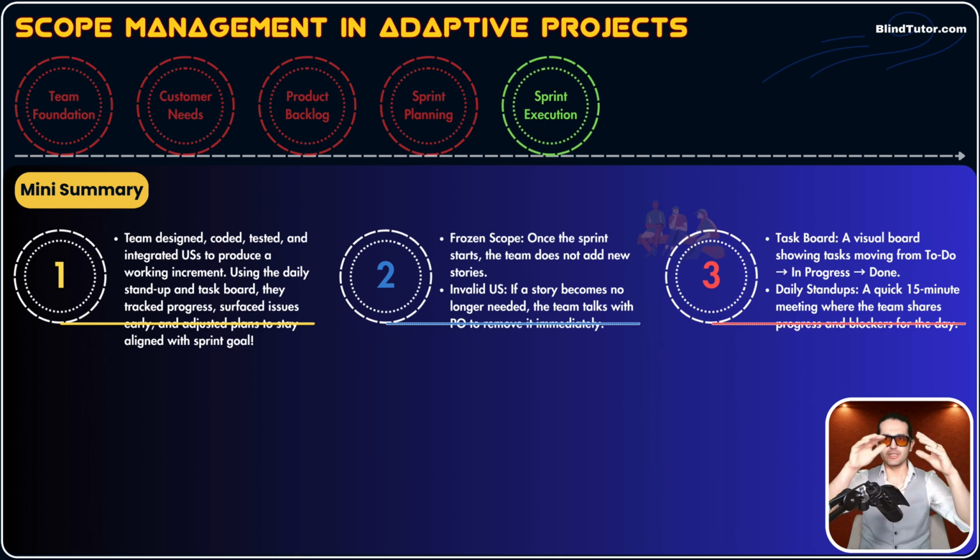While the team is performing the job, executing the scope of the project, they need to use a task board. A task board is a board in project management software that has different columns. For example, it shows what tasks are in progress, what tasks haven't been started, what tasks are in the design stage, in the review stage. It shows the status of all tasks. So everybody in the project, stakeholders, PO, Scrum Master, and all team members, knows what is going on.